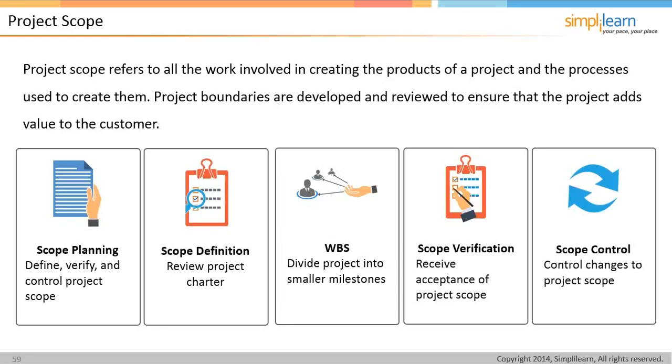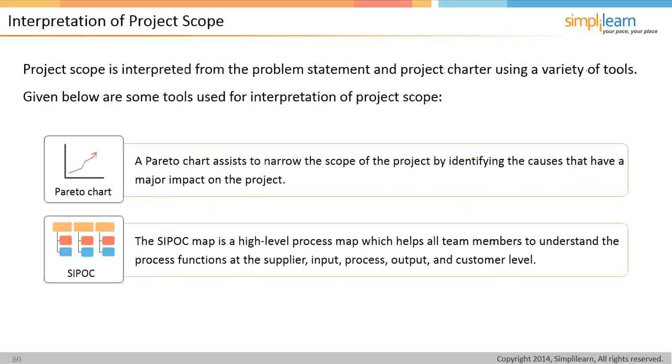If something is found to be really important, whether it's related or not, somebody says, look, we need to include this because we didn't anticipate this being an issue, but it's so important that maybe it's almost as important as your project, even though it's out of scope. It's not so massive that it's a project unto itself, and you've got the right people in place already. You know what? We're going to include this, and we're going to revise the scope and adjust it a little bit. That can happen too.